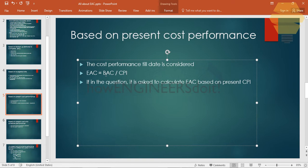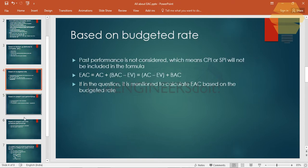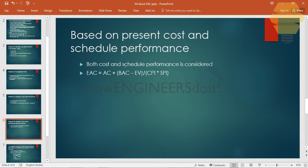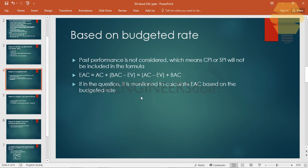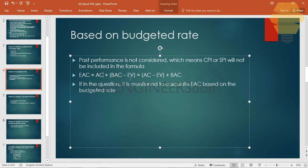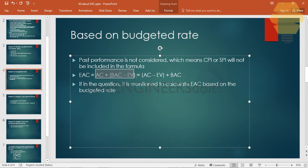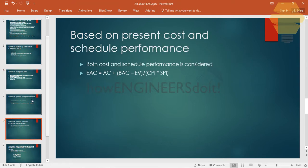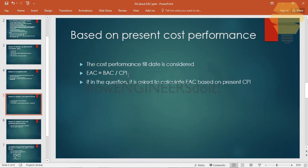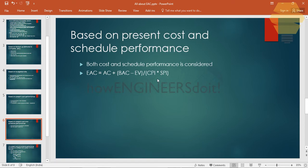The fourth scenario is based on present cost and schedule performance. The formula is: EAC = AC + (BAC − EV) ÷ (CPI × SPI). You divide the remaining work portion by both CPI and SPI. A question may arise: why is BAC ÷ CPI the simpler formula, and once you add scheduled performance into the picture, the formula gets bigger?